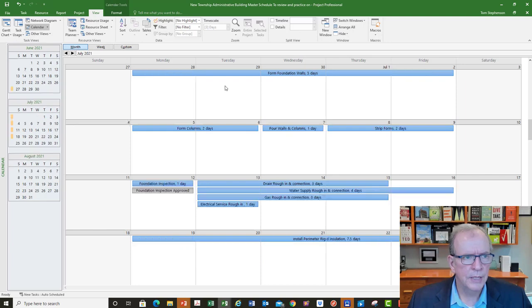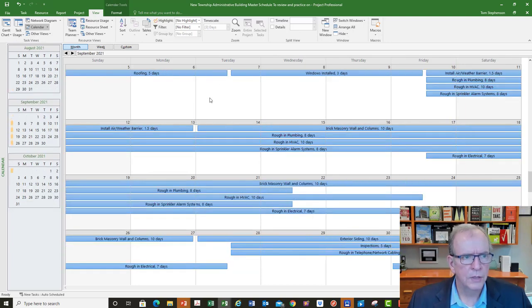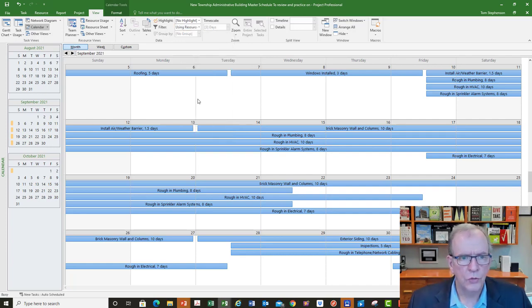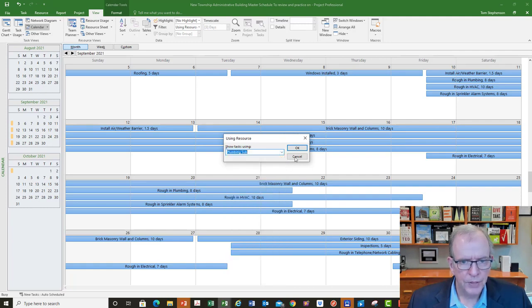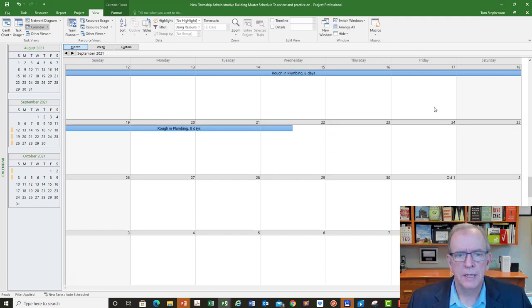if we were, say, let's pick a month here that I know is pretty busy. Let's go to October or September. This is a pretty busy month. If I wanted to filter and I just wanted to see a particular trade, so I just wanted to print off for a particular trade, I could go for here. I could say that I just want the trade that is here, the plumbing sub. If I click plumbing sub, it only leaves the work that the plumbing sub is doing, right?